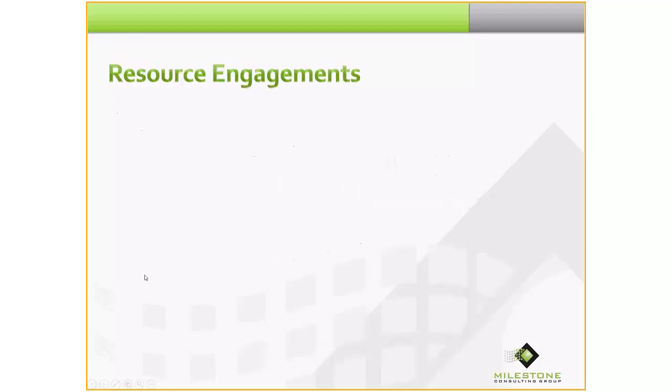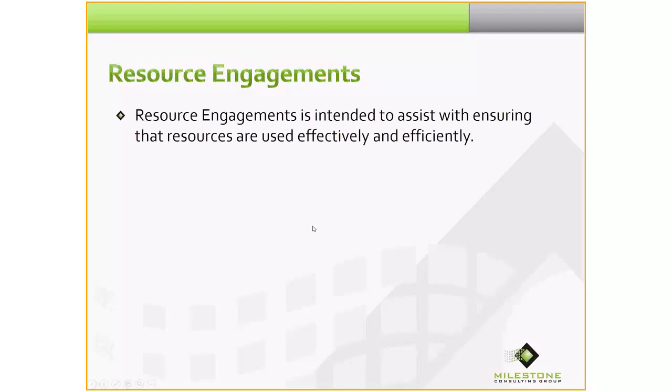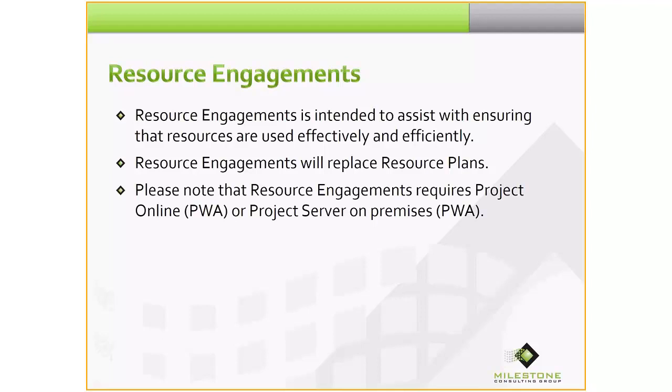And moving along, the next new feature that we'll talk about, and this is really the major upgrade to the Project 2016 environment, is resource engagements. Resource engagements is intended to assist with ensuring that resources are used effectively and efficiently. Resource engagements will replace resource plans. Please note that resource engagements requires Project Online or Project Server on premises.